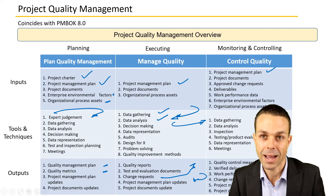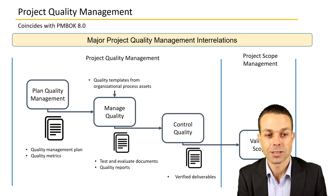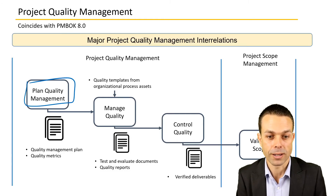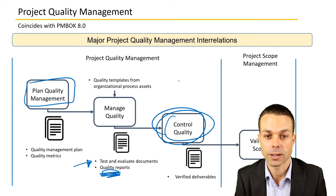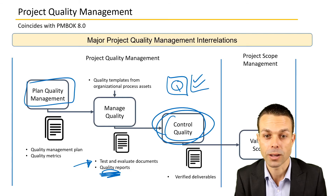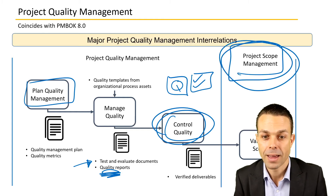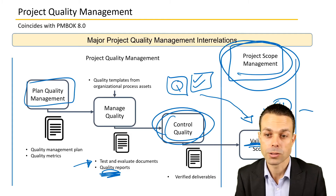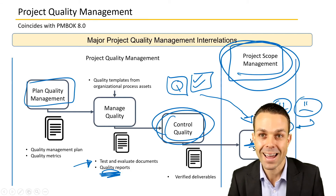Major project quality management interrelations — this is where things can get confusing. Planning quality management is where we plan the process itself. Managing quality is when we're actually testing, with quality reports as an output. That feeds into controlling quality, ensuring deliverables match the customer's specifications. Once done, we go back into the project scope management process group and have the customer validate that scope — confirming it's exactly what they wanted, or triggering a change request process if not.